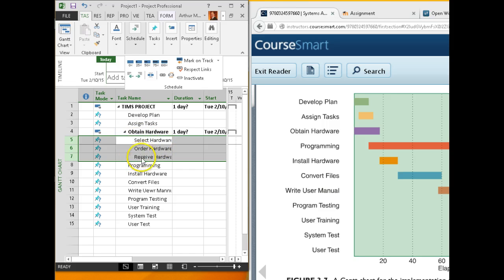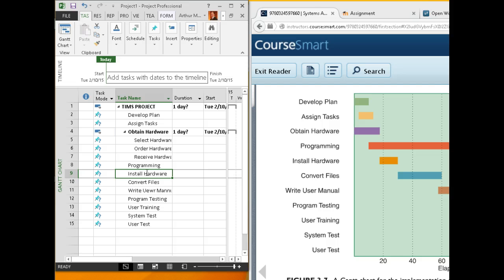And we did this with the patio project. I added different things underneath each part of the patio: planning, analysis, design, implementation, operation. So here we have subtasks and subtasks. And unless we break it down, we'll leave it as a standalone task. If I ever come across one and realize, wait a minute, that has multiple parts, remember what you can do. Just add more tasks beneath it, indent it, and then the programming or whatever you're breaking into small pieces becomes a heading for a main task.